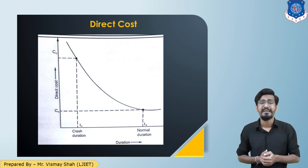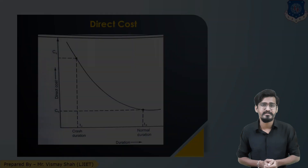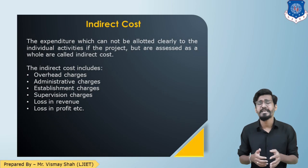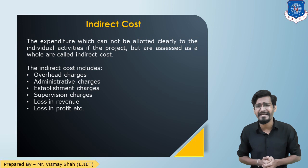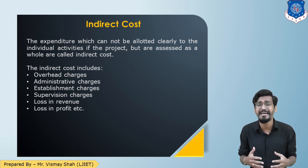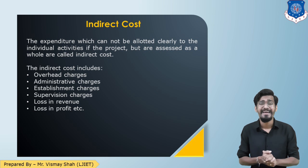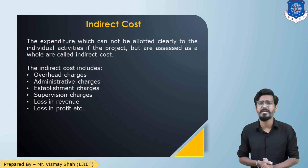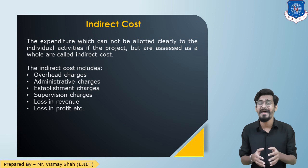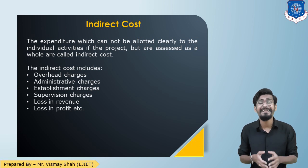The indirect costs are expenditures which cannot be allocated to any specific activity, but can be assessed as a whole. These include overhead charges, administrative charges, supervision charges, establishment charges, loss in profit, loss in revenue, etc. These are some examples of indirect costs.